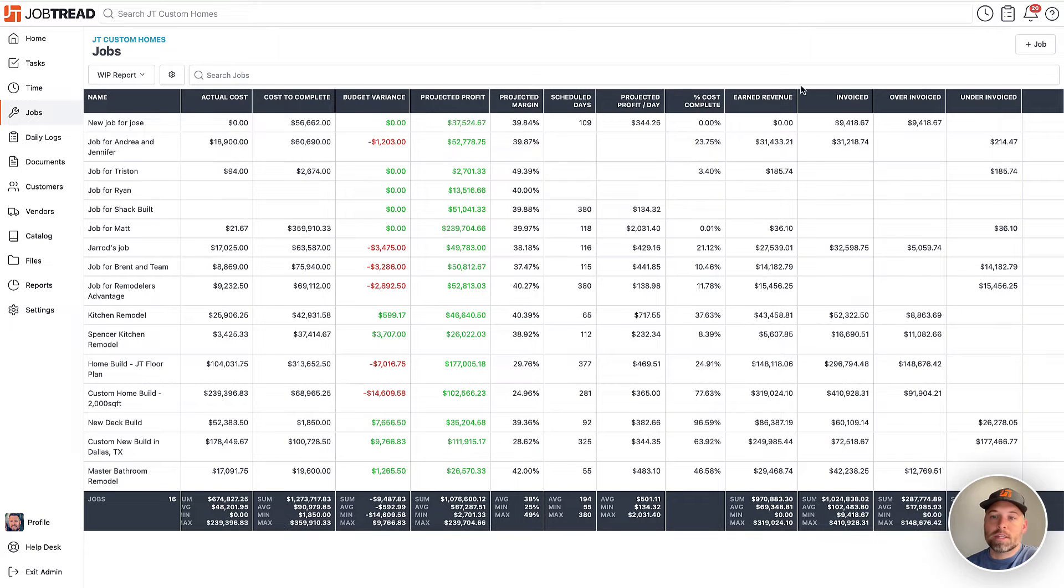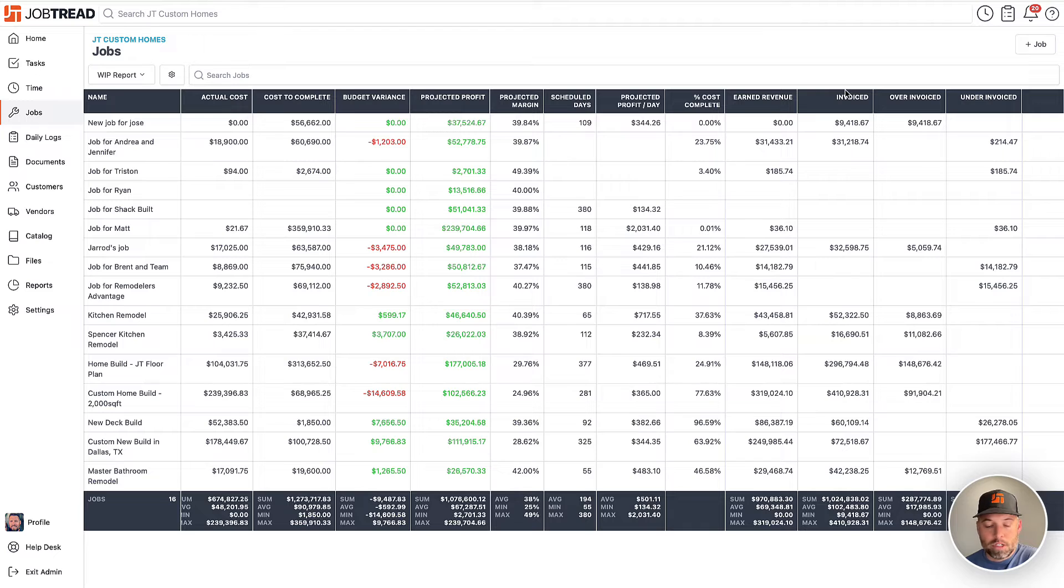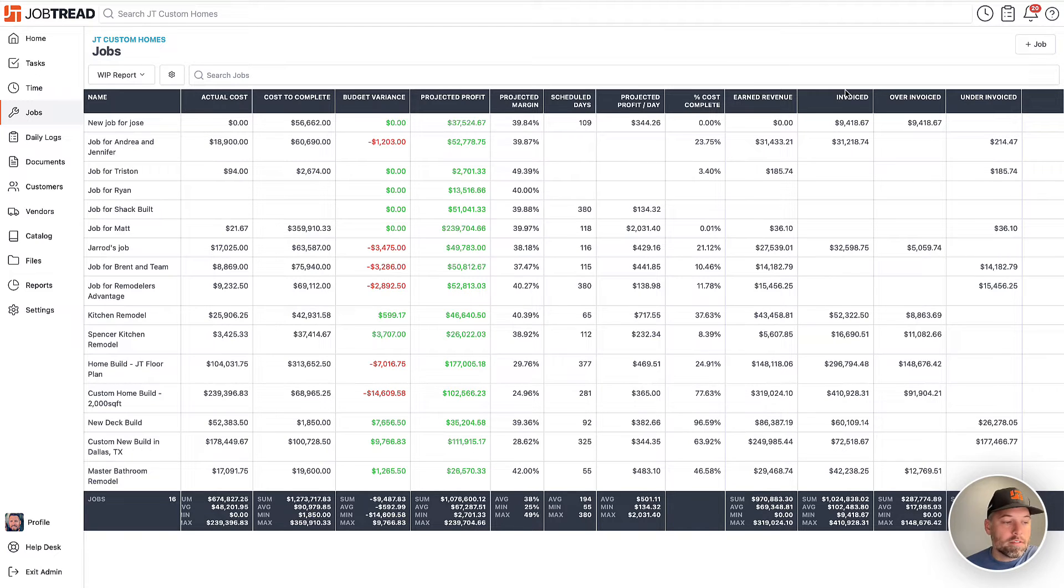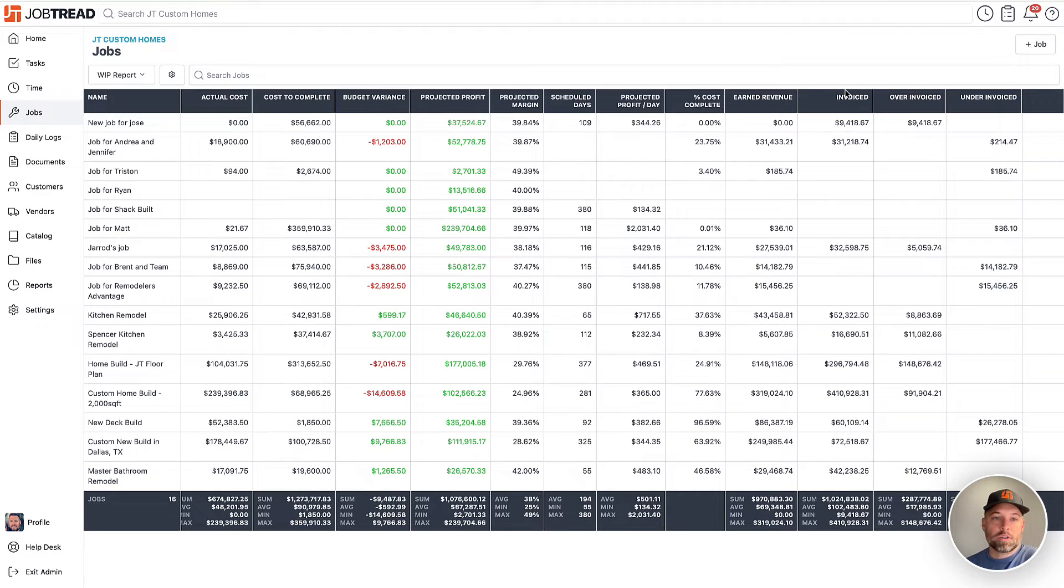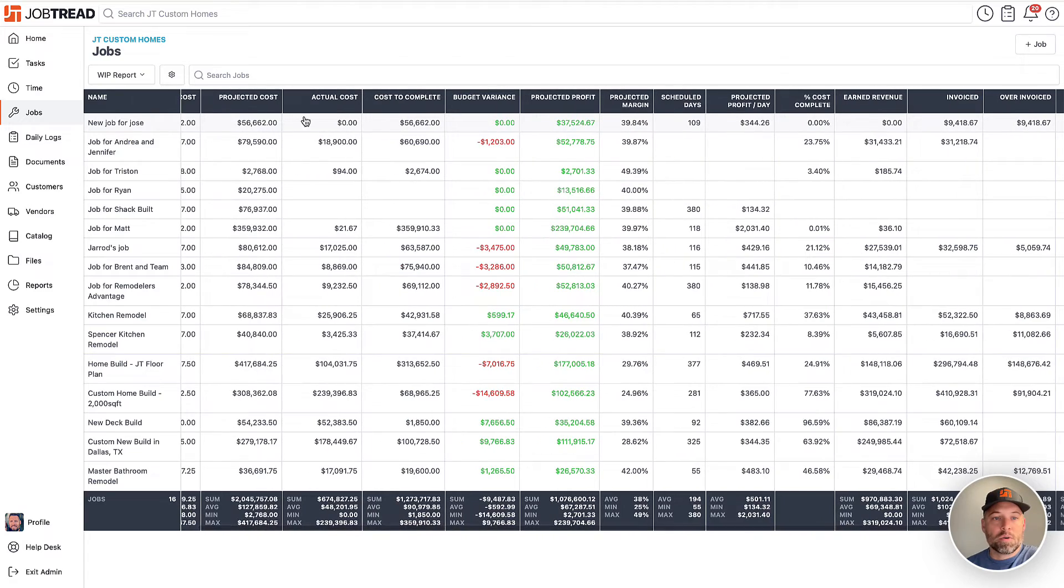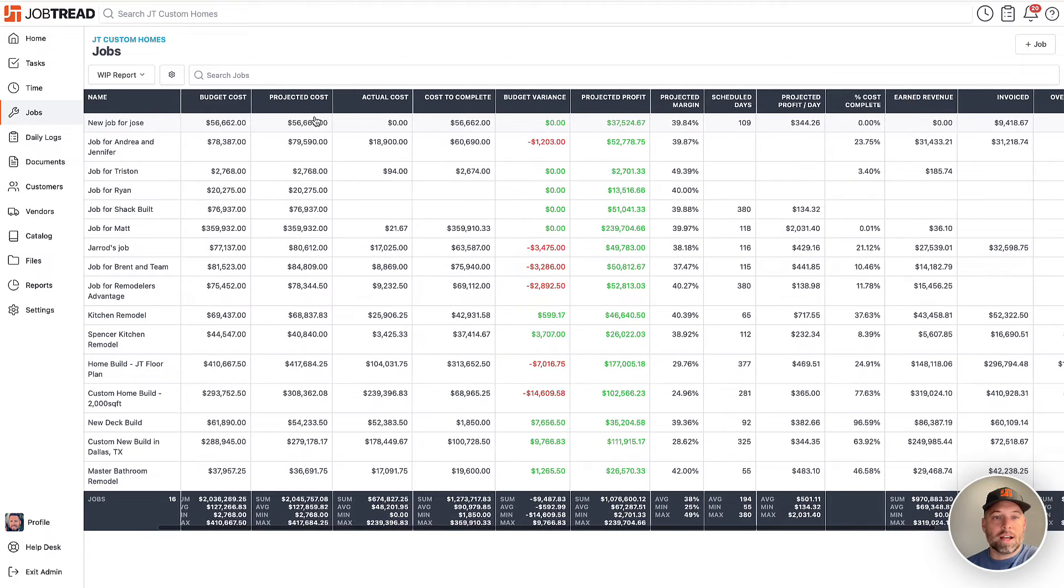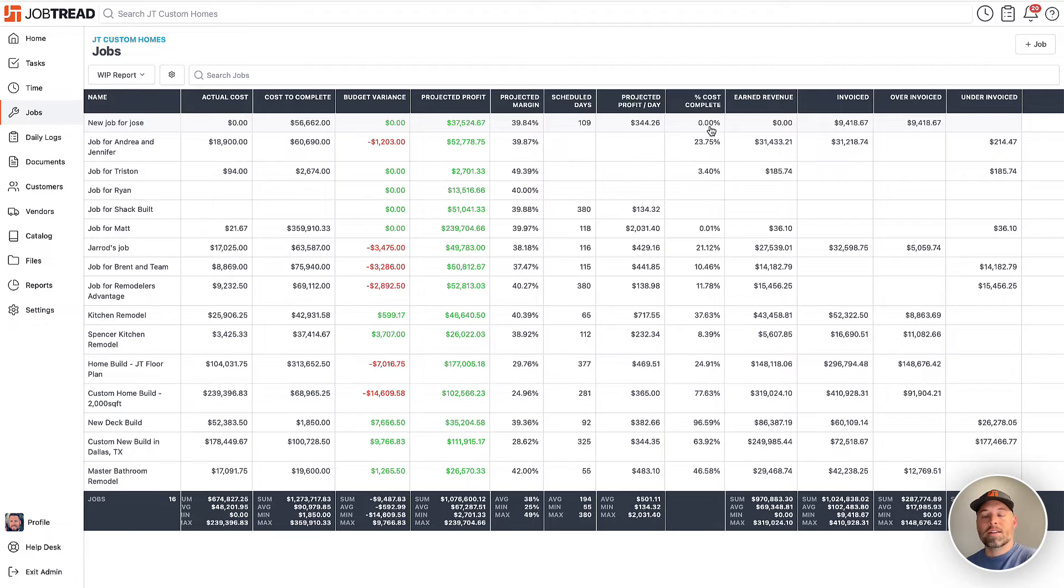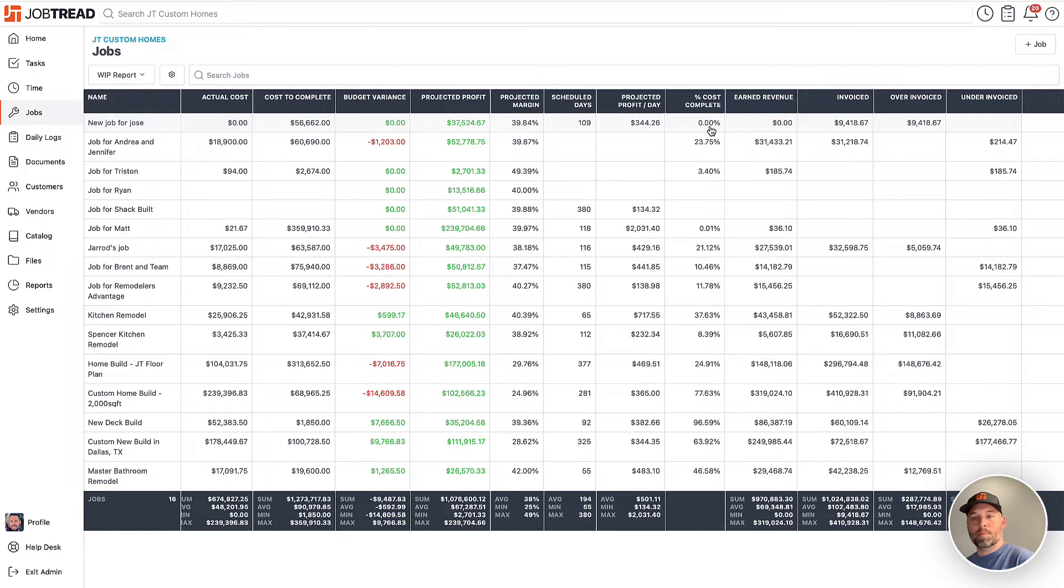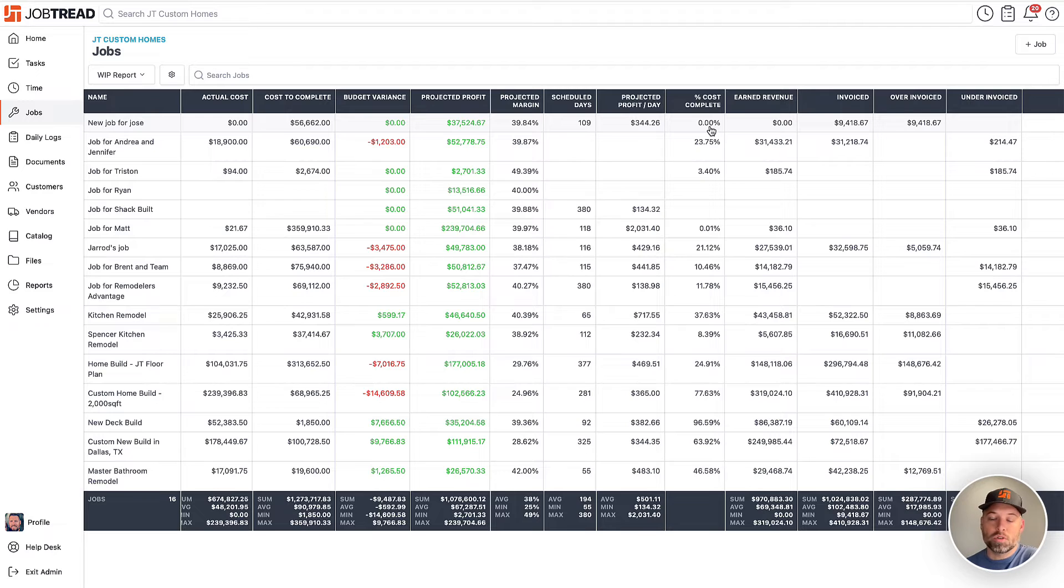Off to the right, this in my eyes is the most important thing. The first column we see here is the percent cost complete. You can think of this as based off the total amount we're going to spend on this project, how far along are we? So it's going to take your actual cost and divide that by your projected cost. So how far along are we? Not necessarily based off the schedule, but based on how much we've spent relative to the total.